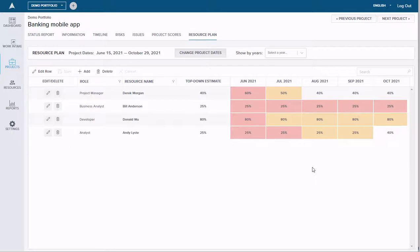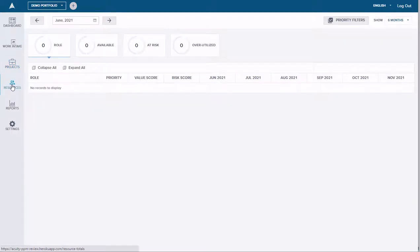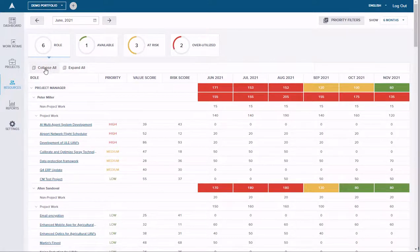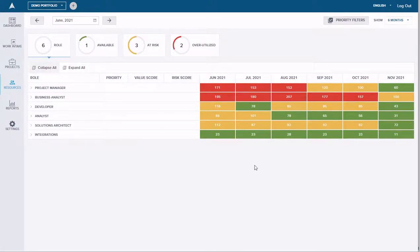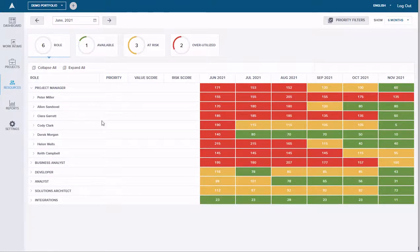This is an enhancement to Acuity's resource planning — heat mapping available at the project level. If we roll this up and click on the resource tab, we can see a heat map at the team level or by role. Project managers and business analysts are completely overutilized over the summer and even into the fall, whereas other teams have availability. We can expand this and see that, for example, Derek in the month of July has some availability to start new work. Otherwise, the project management team is extremely overutilized.